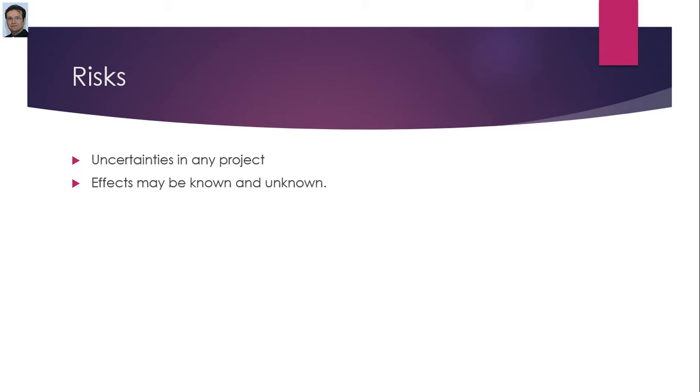Prior to starting your work on identify risk, always remember you must take the requirement management plan, scope management plan, schedule management plan, cost management plan, resource management plan, quality management plan, and obviously the risk management plan. So when do you start your work on identifying risk for your project?